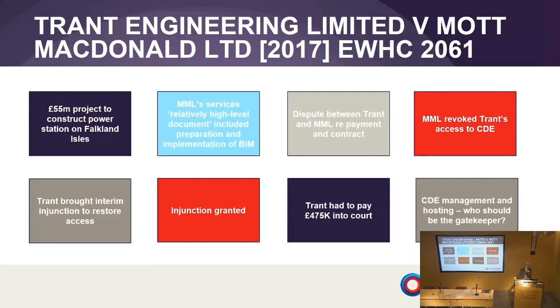So the case has opened up a bit of thinking about who should host the common data environment. If there's a bi-party disagreement, so I've employed John and Nigel, and I have an argument with John, he can't take Nigel's work away as well. He might have contractual rights to take his own work away, but he can't take anybody else's work away. Who should host the common data environment going forwards?